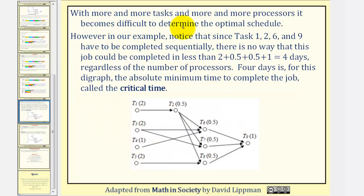With more and more tasks and more and more processors, it becomes difficult to determine the optimal schedule. However, in our example, notice that tasks one, two, six, and nine have to be completed sequentially, which we can see here: task one, two, six, and then nine.